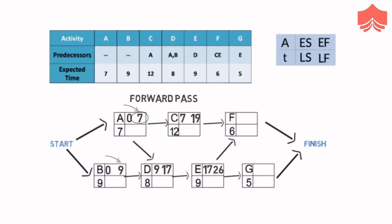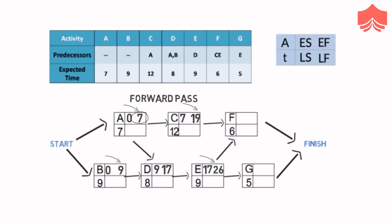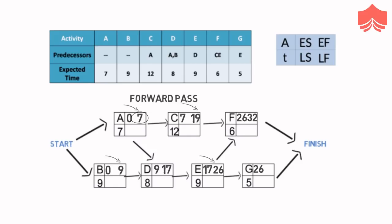F needs E and C to finish first. Both of them will not finish before 26, as E has the earliest finish at 26. Therefore F can start at the earliest at 26, and finish at 32 after consuming its 6 days. G only has one predecessor, E, and E will finish on 26, therefore G can start at the earliest at 26 and finish at the earliest at 26 plus 5 equals 31. As we can see, the last activity to finish is F, which will finish on day 32, therefore the project will take 32 days.